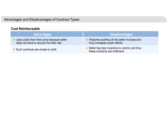The biggest disadvantage with the cost-based contracting method is that the seller makes more money if the cost goes higher. So there is no incentive for the seller to control cost. The advantage is that it's easier to get a seller to work on such contracts.